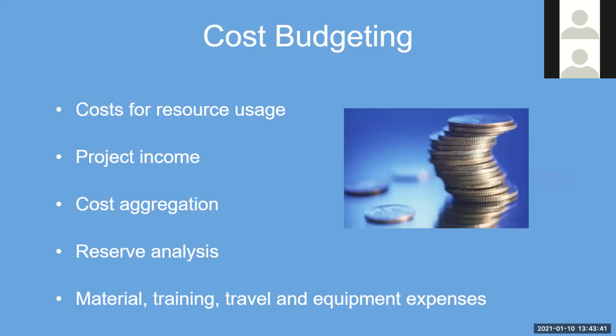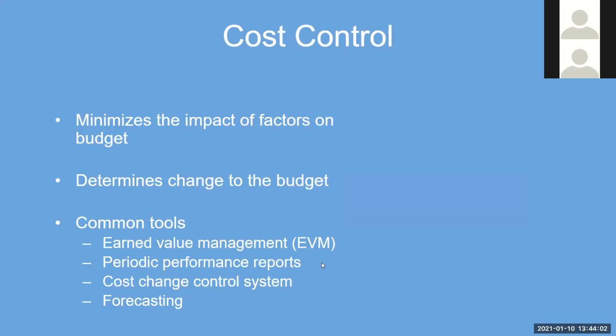You want to aggregate all the costs. You can also classify them by cost center in your organization, by type of activity, and of course, by requirement or work item on your task spreadsheet. If you are traveling or have other expenses, you want to include those as well, not just labor or direct cost.